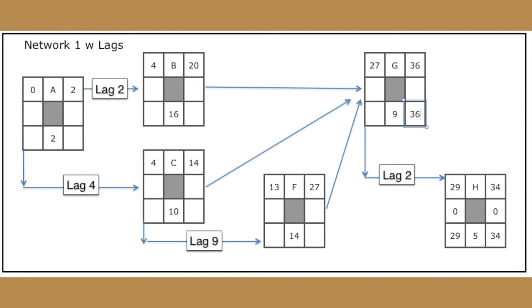And what we're going to do here is we're going to put 36 down here as well. 27 is going to go there. Now 27, we need to think about that a little bit though, because we could also put whatever 29 minus 2. There's actually two candidates for going in there. They happen to both be 27, however. 27 gets carried back to here. So we're going along here. Now 27 is going to come back down here, because you notice that this finish is only related to the start of G. Same thing over here. 27 is going to go up there.